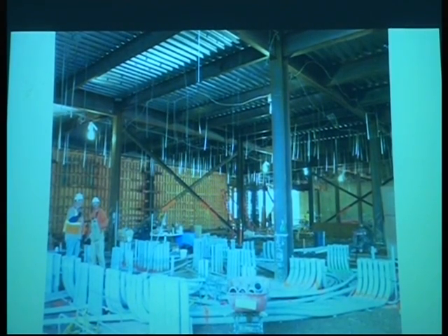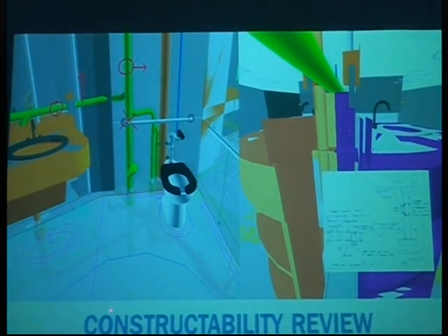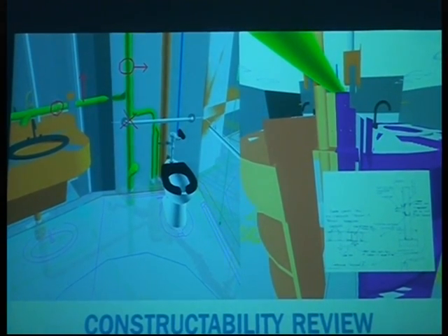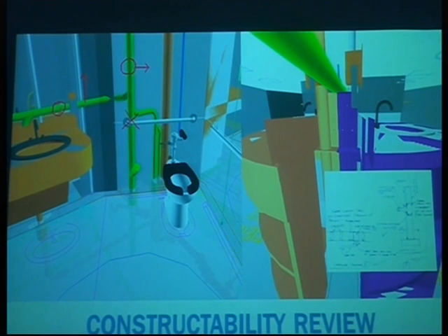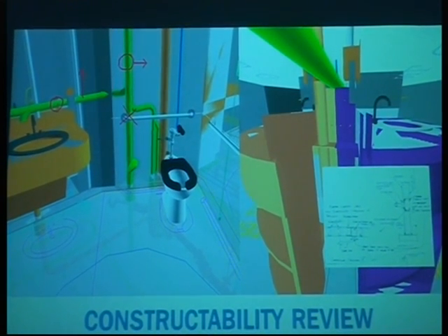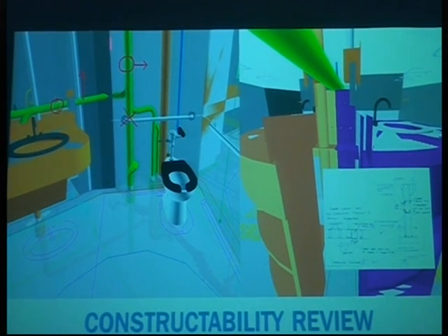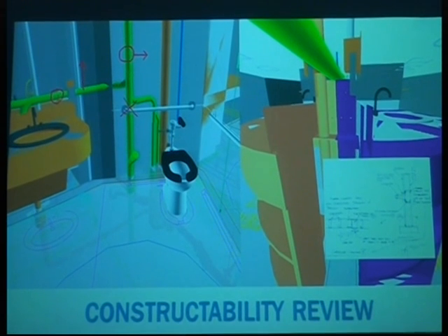And obviously some of these pipes, underground pipes as well. What BIM helps us also to achieve, not just coordination between utilities, but even conducting some constructability reviews. Something as simple as a handicap or an ADA grab bar that conflicts with a riser, a drainage riser. You don't see that on the drawing.